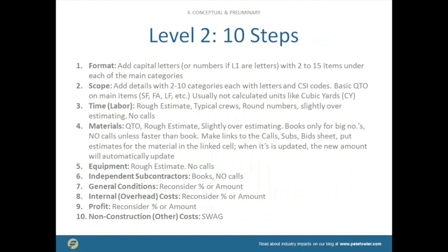Hopefully that makes sense how I said this. So at level 1, we're just saying, oh, we've got a custom home with nice vinyl-clad wood windows or aluminum-clad wood windows. I bet we're going to pay $100,000 for windows and doors, for material and installation. And so at level 2, we're breaking that down to, okay, on the front elevation, we've got this many.